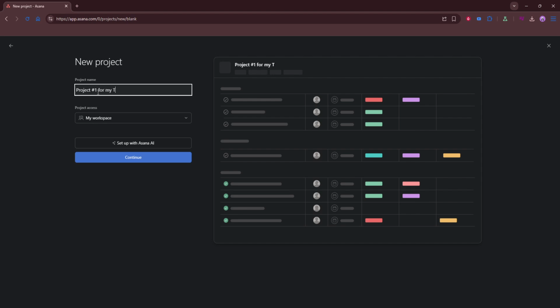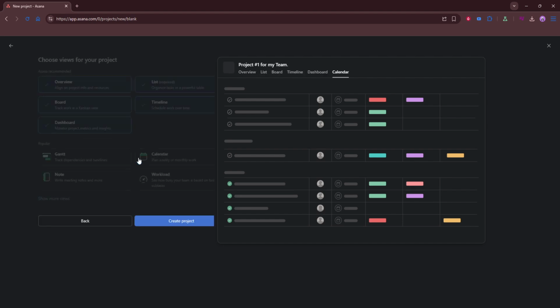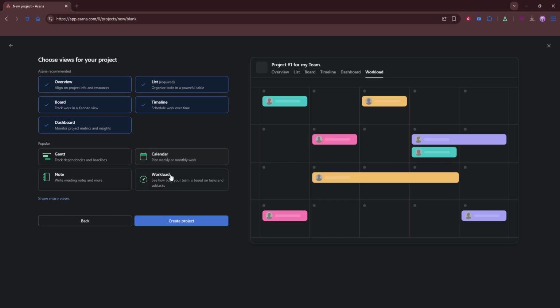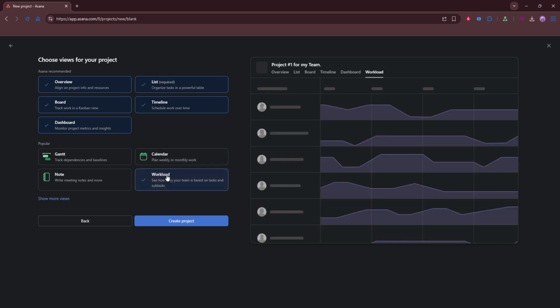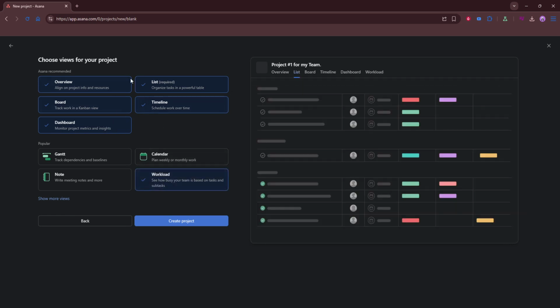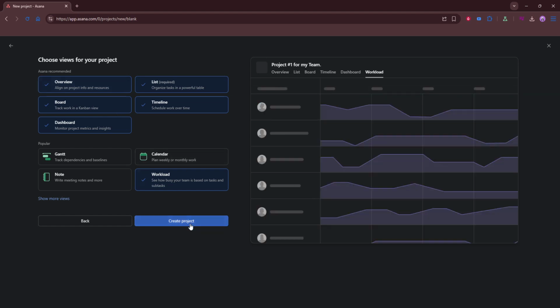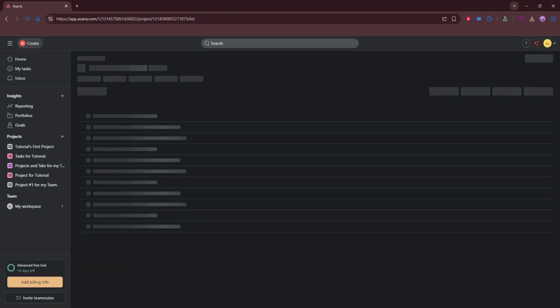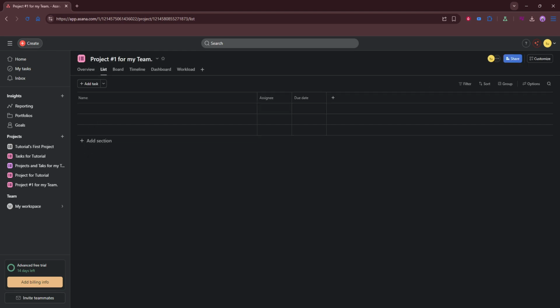Begin adding tasks, sections, deadlines, and responsible people. Break work into tasks that are small, actionable, and have a single owner. Use sections to organize stages or categories like to do, doing, and done, or by milestones. Assign each task to the right person with a realistic due date, and add a short description, relevant files, and any subtasks or dependencies for clarity. Clear owners and deadlines build momentum.